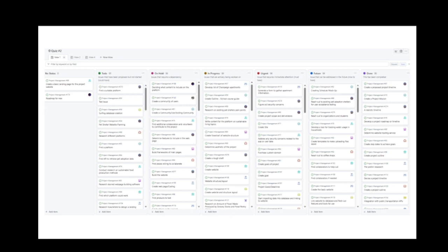So whether it was something you need to put in to do, or on hold, or in progress, or urgent, or so forth, whatever category you want to put it in, and then having the right scope, something achievable, something just about the right size, and then in the right time frame. So is this something that's a future thing or something that can be done within maybe a month?